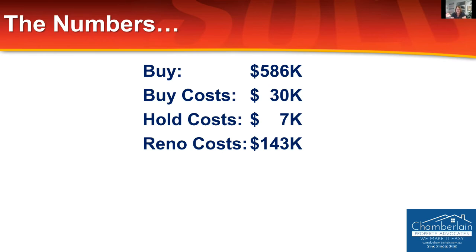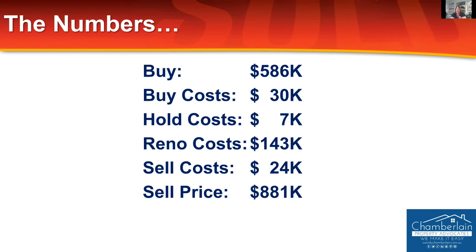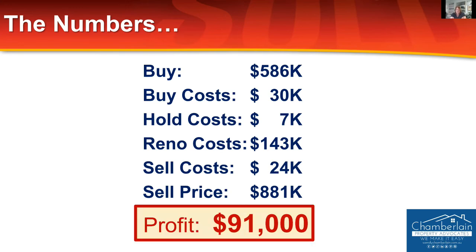Absolutely. And even with the next project that we're about to start, when I ask them to come and quote, they're there. Tell me a day, I'm going to be there, Wendy. That's what they're telling me. So you bought this for $586. There are a whole pile of costs in the middle, including the renovation. You sold it at $881, and you made $91,000 in profit.